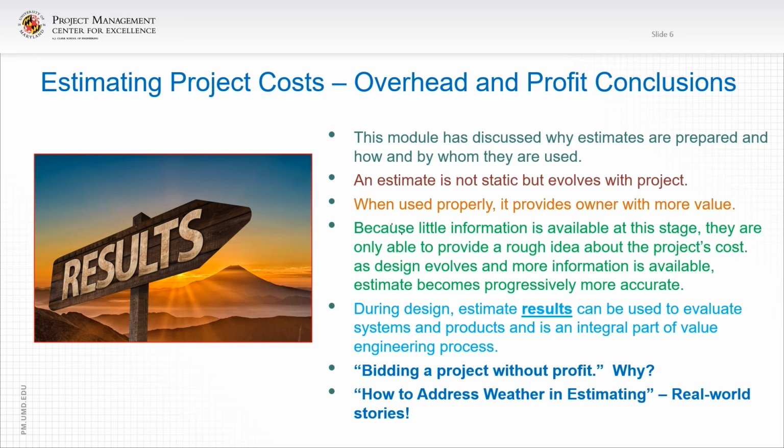I knew a company that went after a project. It was during the hurricane season, but the contractor decided to include a tremendous amount of rain days, and lost days in its schedule. The owner wanted the contractors to submit a bid for cost and schedule. Turned out this contractor had so much time in there for potential unusual rain conditions that they lost the job because the schedule was too long.